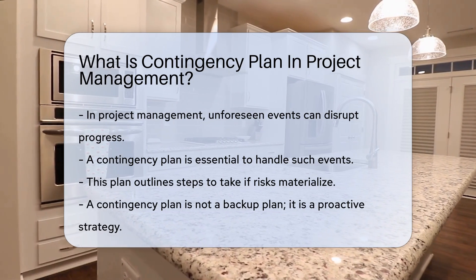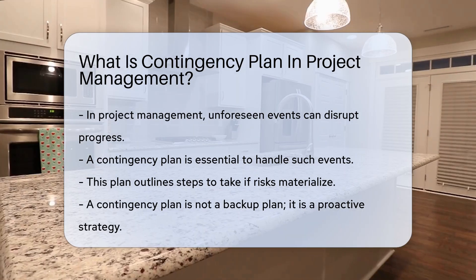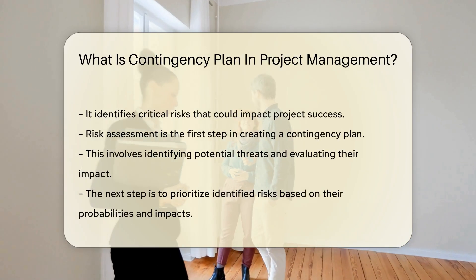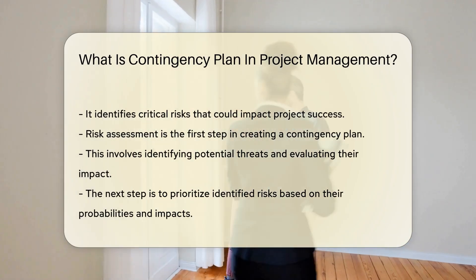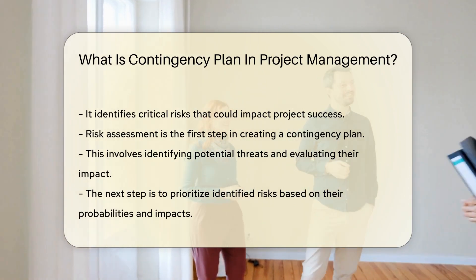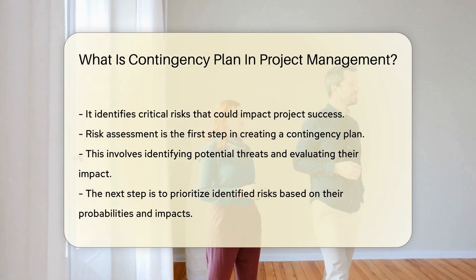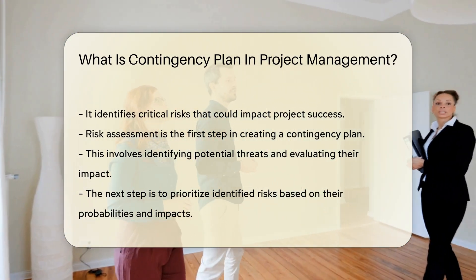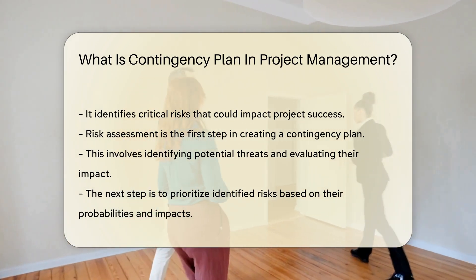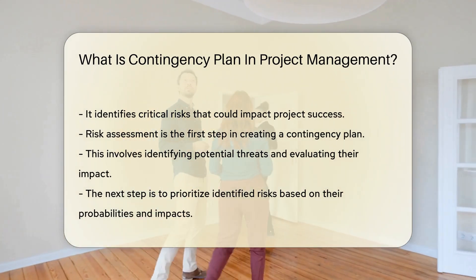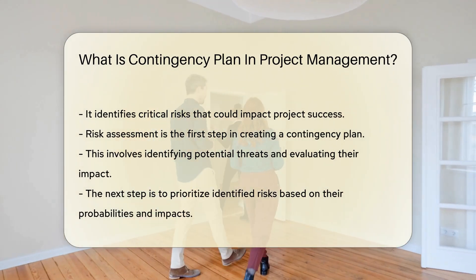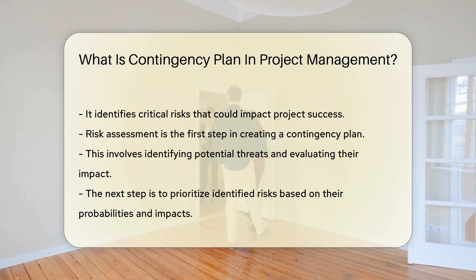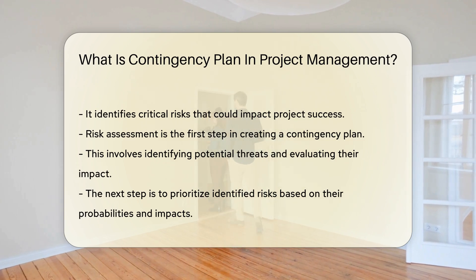It identifies critical risks that could impact project success. Risk assessment is the first step in creating a contingency plan. This involves identifying potential threats and evaluating their impact. Once risks are identified, the next step is to prioritize them. Not all risks are equal — some have higher probabilities and impacts. After prioritizing, develop specific actions to mitigate each risk.